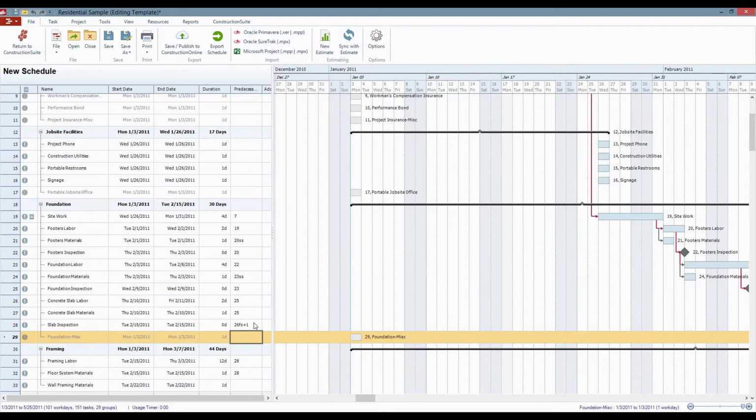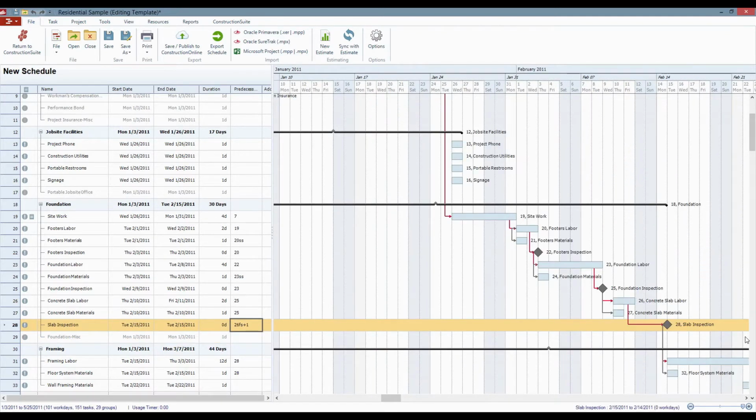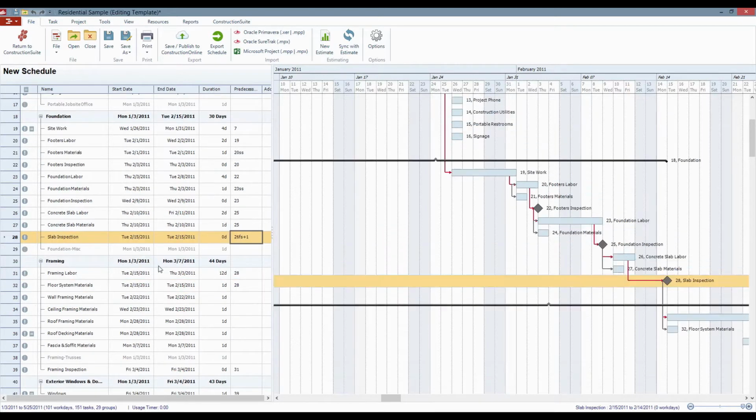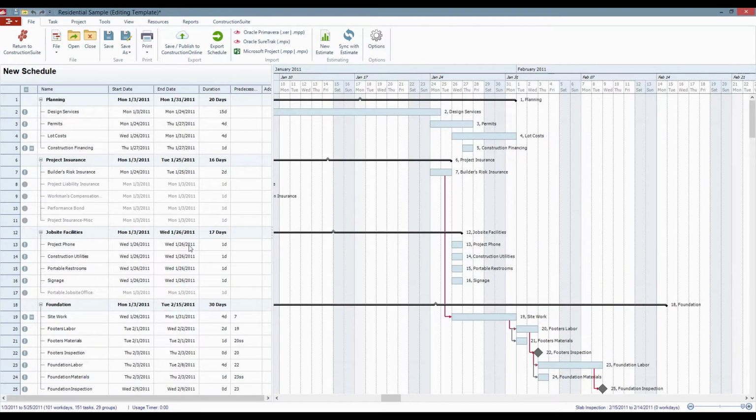And in that time, it's going to actually build in a little bit of wiggle room throughout the rest of the schedule, so that now the concrete might have a little bit of time to dry, but we can still get in there and take care of a couple of odds and ends or something like that if something comes up. So these are some of the possibilities that you guys have with predecessor relationships, and once you build this information together, you set up your groups and your tasks.